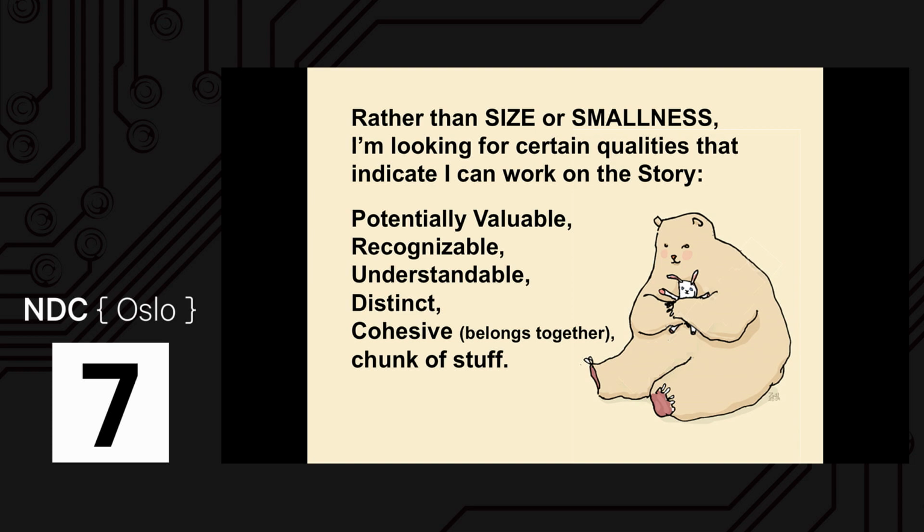If it's potentially valuable, let's say I recognize that part as being potentially valuable, and I'm talking with my customer, who says, yeah, that would be valuable for us to have. I can figure out what's cohesive, what belongs together and what doesn't, and figure out which one of these we want to work on first. And now I've gotten something quite a bit smaller, and I did no estimates. This is clearly smaller than what this was originally, and each one of these bits is smaller. This is now smaller because we've taken out something to work on.